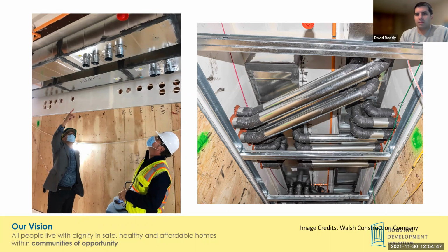So if adopting this design of putting all this ductwork within the condition envelope, as was done here, it's really important to work with your local authority to have that approved. The nice thing is a very solid case was built to do this.